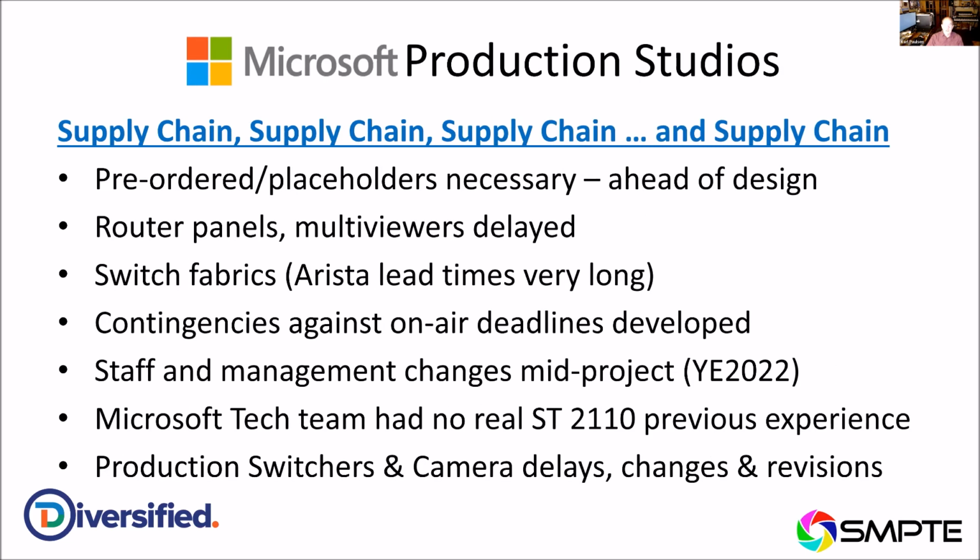Supply chain, supply chain, supply chain, and supply chain. We all got so tired of hearing that word. It's like a bad nightmare. Pre-ordering of placements was necessary, well ahead of the design. We picked products before we knew we had to really design them.